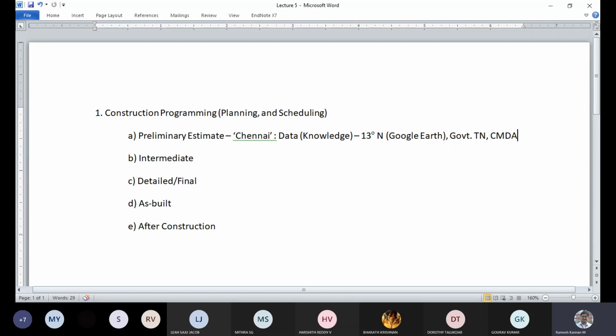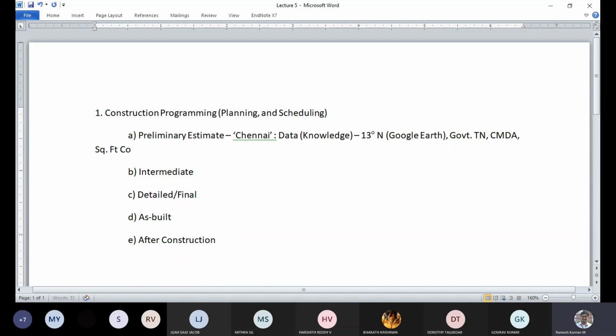That will give you roughly, say for example, the square feet cost. Say a place in Chennai called Kelambakkam, right? So per square feet, the cost ranges from probably 2,600 to 4,000 at maximum, right? So if you want to construct an apartment here, this will be your basic estimate. So what happens if you give 9,000 a square feet or 6,000 a square feet? Nobody's going to buy your project, right? So as simple as that.